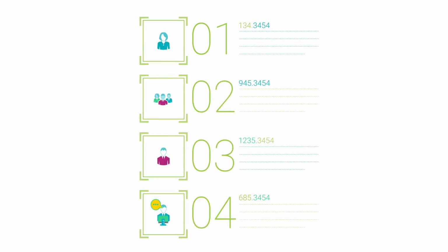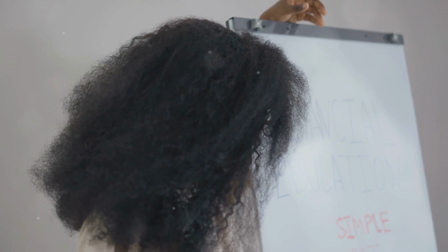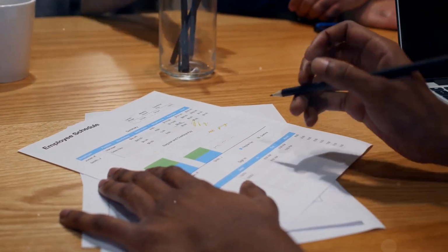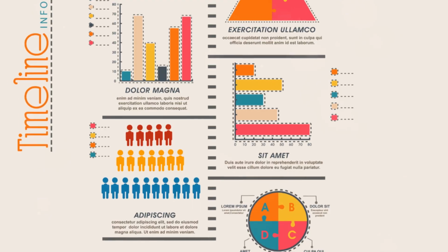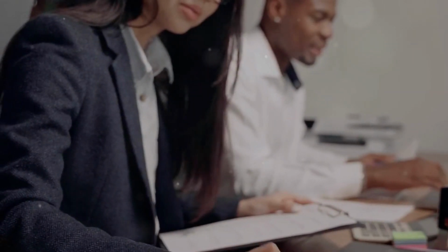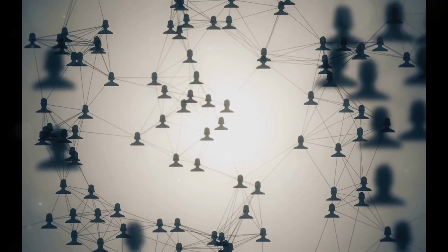For example, if the project starts on day 1 and the first activity lasts 2 days, its ES is day 1 and its EF is day 3. For activities with predecessors, the ES is determined by the latest EF among them. The process continues through the project network diagram, providing a clear picture of the earliest possible completion time. These dates are crucial for establishing the project baseline and making informed decisions.